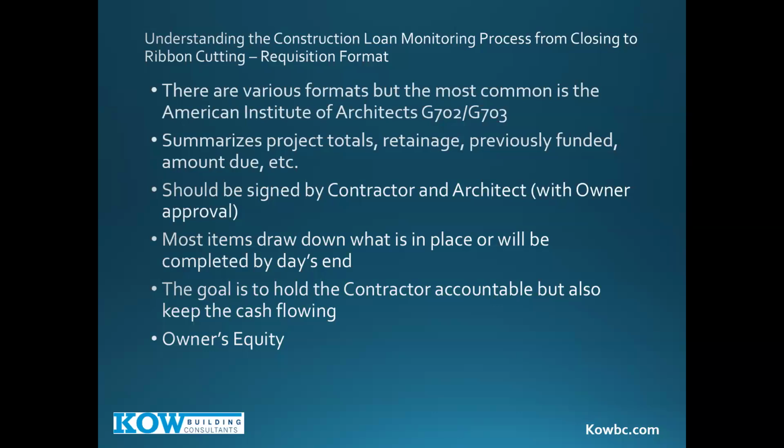It is going to be signed by the contractor and architect, and the goal of what we do and the goal of this document is to hold the contractor accountable for no more money than they're due, but to keep the cash flowing as it's applicable, as it's warranted. Because like I said before, we want the plumber leaving on Friday and saying, see you Monday, not I'm pulling our workers off, our materials, our gang box, and our equipment, and we're going across town to a project that is paying us. Because now if there's a callback for that sub, that's going to delay you. I promise you it'll delay you.